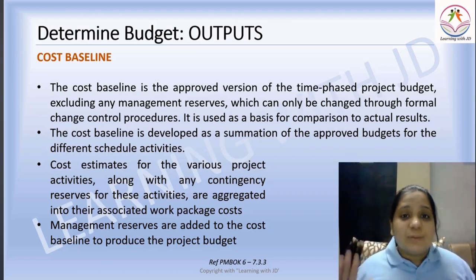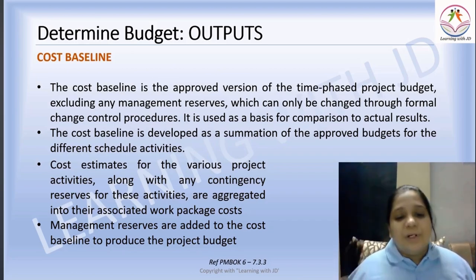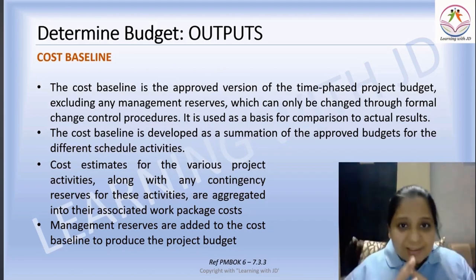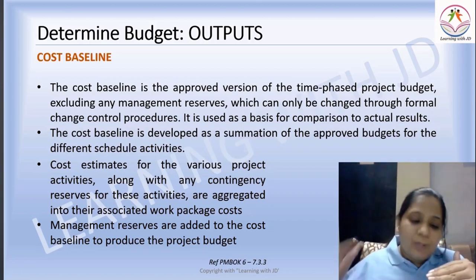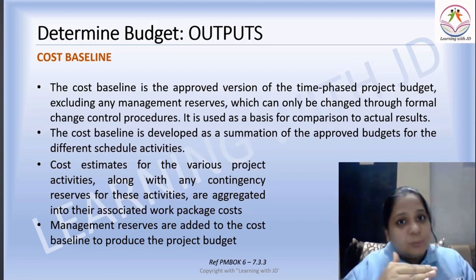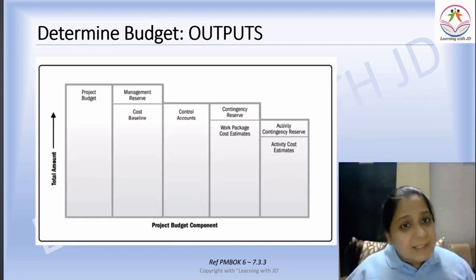Management reserves are added to the cost baseline to produce the project budget. So there's a cost baseline, you add management reserves to that and you will get your entire budget of the project. This is how exactly it looks like.